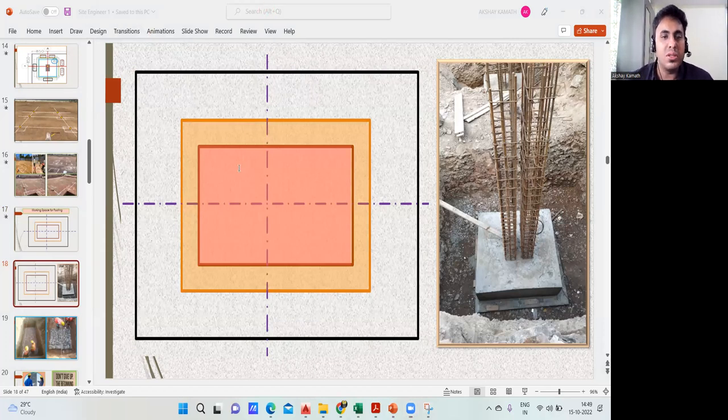Okay, so I told this will be 50 mm. I'll quickly write 50 here. This also will be 50. It is there in the drawing. This 50 will be written in the drawing, whereas the working space 300, you have to assume it 300. This is also 300. So this is the same on all four sides. On this side also it is 300. Here also it is 300. And this PCC offset is 50 here also, 50 here also. Okay, this much is clear.